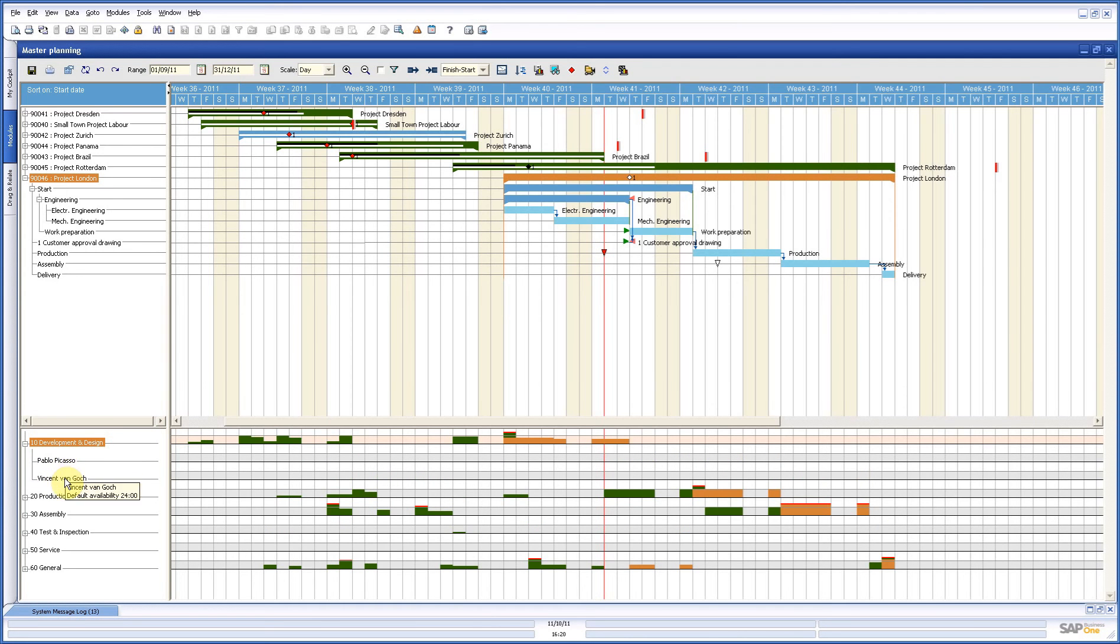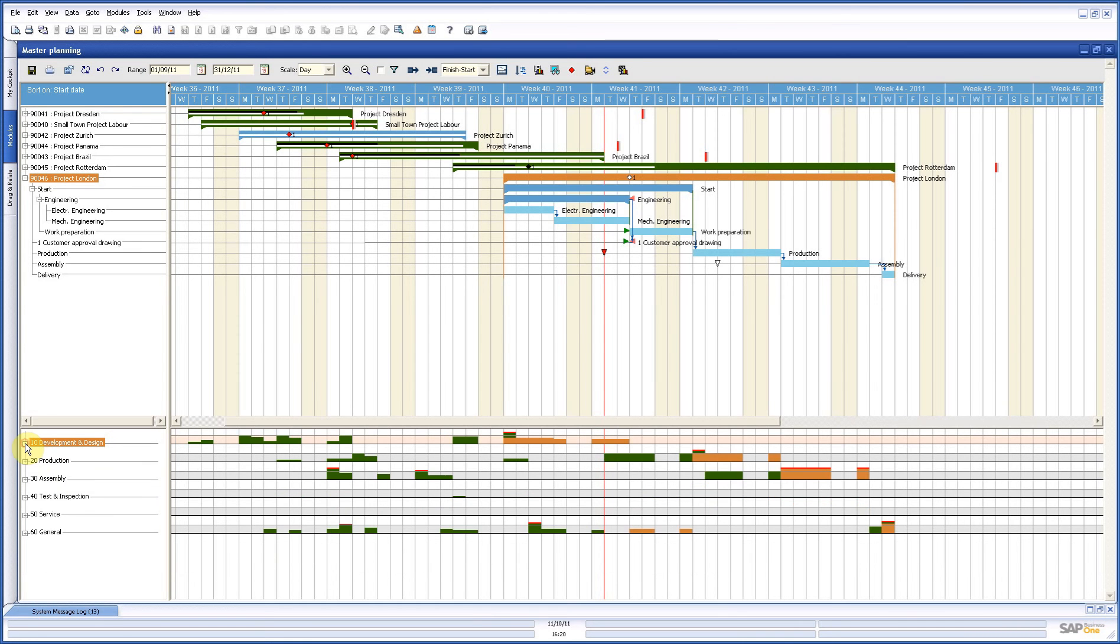Pablo is working 40 hours, Vincent 24, so altogether 64 hours. And that is what you see here on the right side in this bar. It is 64 hours of capacity per week.